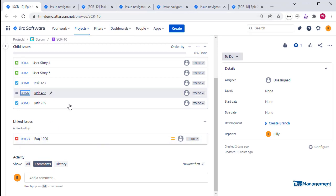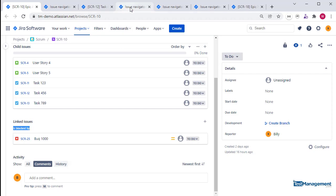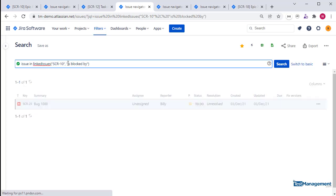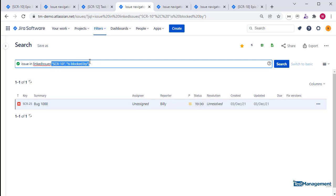If you want to search based on link type, so these are linked issues of type 'is blocked by', then you can also pass that in as a second parameter in this function. Using 'is blocked by', which is case sensitive, if you pass both of those values in, then it will only bring back linked issues that are of link type 'is blocked by'.